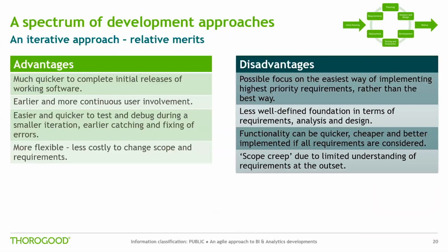Some disadvantages: there is a possible focus on what's easiest to implement first, or on the easiest way of implementing highest priority requirements, rather than the best way. There is a less well-defined foundation in terms of requirement analysis and design based only on partial requirements, which may lead to scalability issues for future changes.